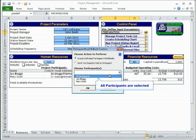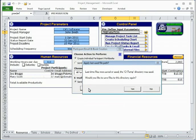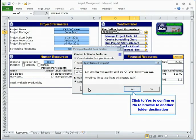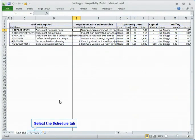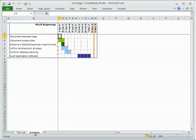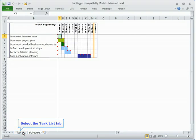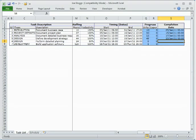Creation of participant workbooks provides the ability to recuperate task progress information automatically once participants have updated them. The created workbooks consist of a task list and schedule for the individual participant. The participant can update progress in the cells provided and send back the workbook.